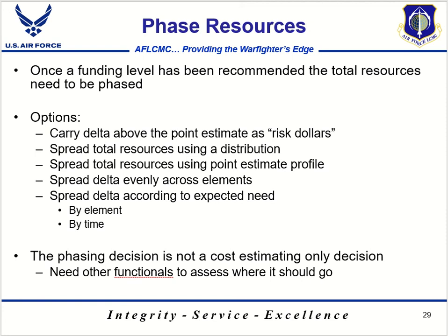You could also spread them evenly based on the point estimate phasing, or you could get more specific and spread them based on specific scenarios that might play out in the program. And again, this is not a decision made in a vacuum. You'll always be involving your program team in this.